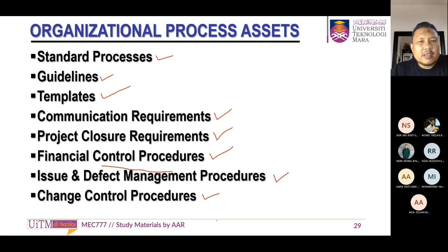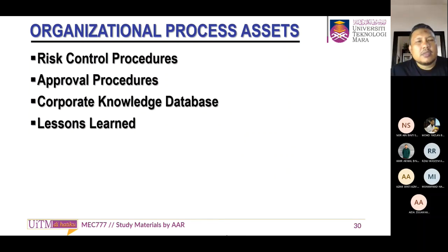This is one of the committees that is always looking into the issues that happen in the construction, and then this board or this body will declare whether the changes can be made or not through the control procedures. If you look at the control procedure, yes, we can do some changes here because of that, and normally this committee will agree, and then the changes can be done. All right.